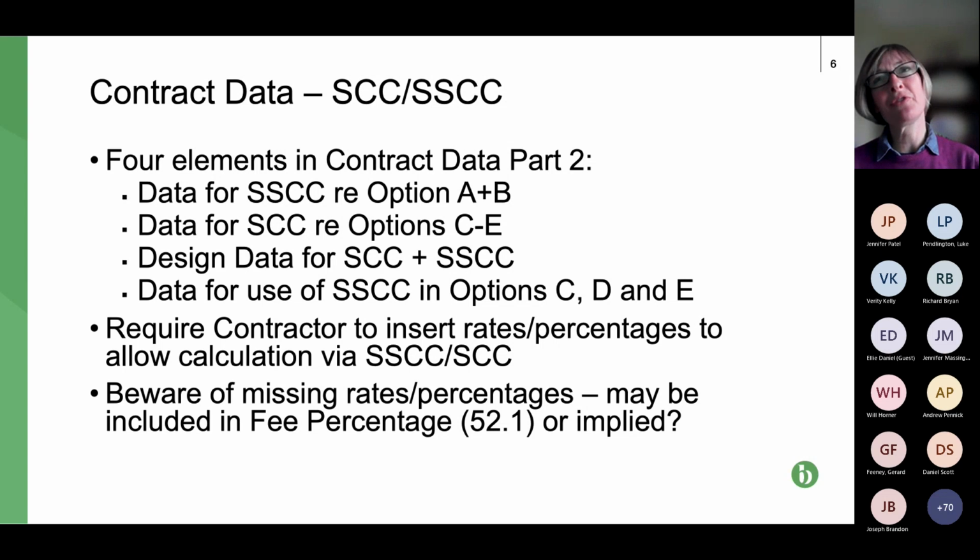I think I quite often refer to this. I once had a client who only filled its name in the schedule of the contract data part 2. None of the blank spaces for pound signs, price lists, etc. It does raise a serious issue that actually it makes the schedule of cost components and the shorter schedule pretty much inoperable.